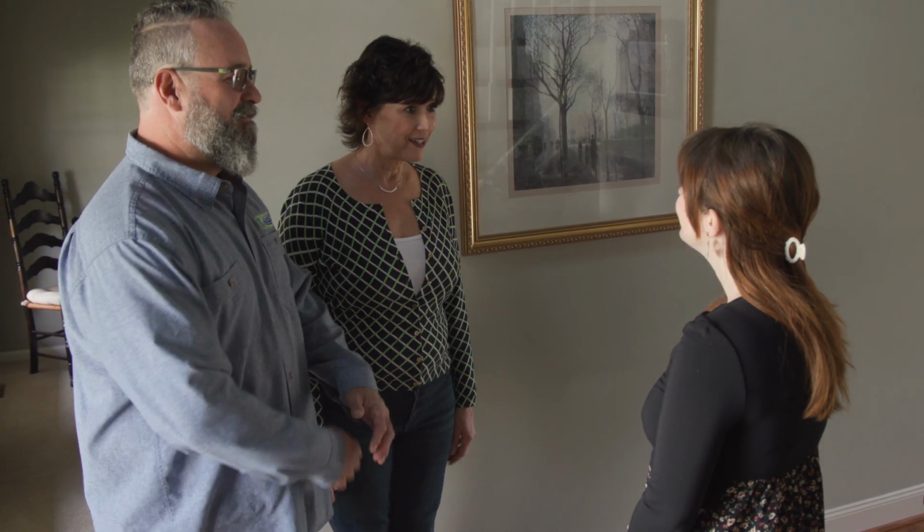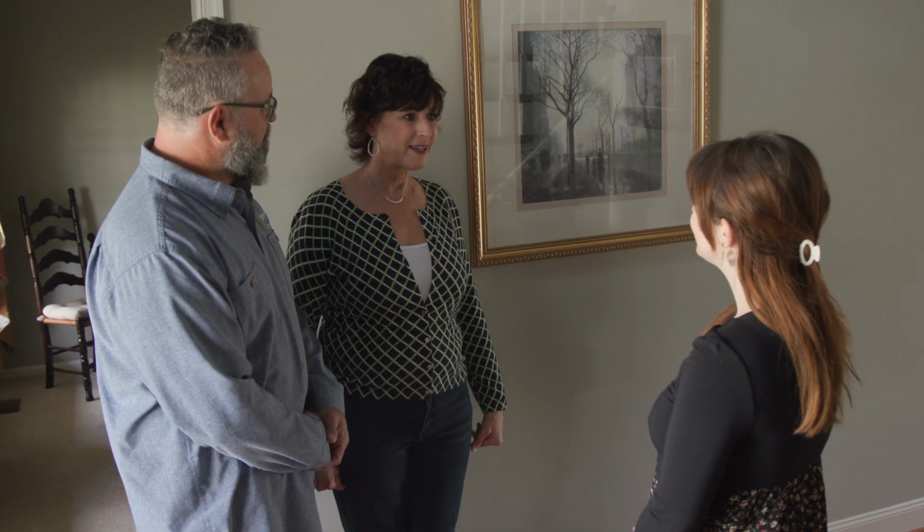For Spring Creek Design, why is more important than how for renovation. Our firm employs a three-step process that begins with what we call a feasibility study. And a feasibility study is an examination of what the client is hoping to achieve, along with the reasons why it's important to do that. And we explore those ideas with our architect to develop some preliminary plans that allow us both to illustrate how we can address the client's needs, as well as gives us something that we can develop some cost estimates around to make sure that the solutions we're proposing are compatible with the client's budget before we go too much further in the process. Assuming that we successfully conclude that, we move to our second step.